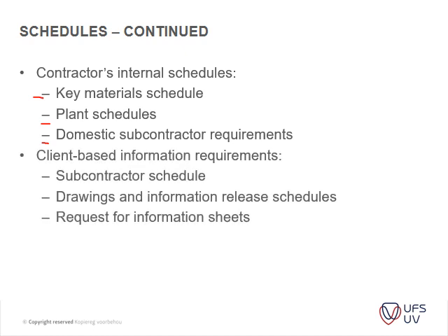Your client-based information requirements, the contractor schedule. Client needs to know when you're going to erect that. For instance, if tenants have to be moved, if he has to supply you with certain information by a certain time, drawings and information release schedules, requests for information sheets. This is essential and extremely important.